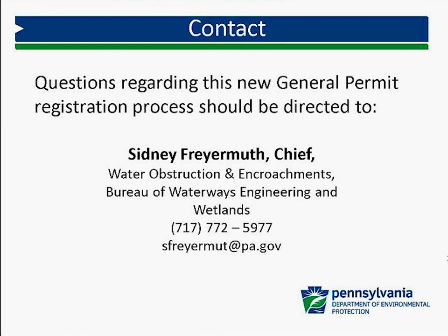To clarify, all proposed impacts to wetlands in counties with known occurrence of bog turtles still require a Phase 1 bog turtle survey, not just areas within the P&I hits for bog turtle? That is correct.